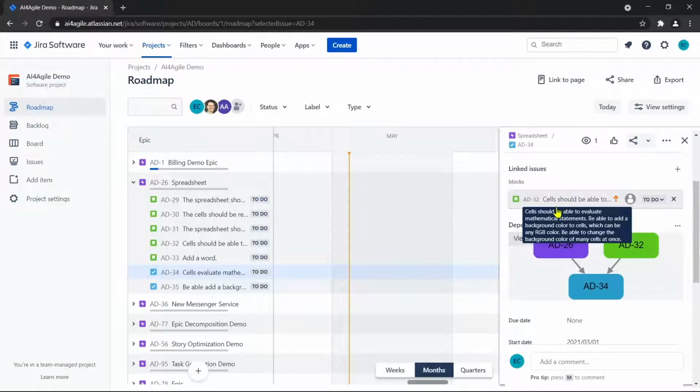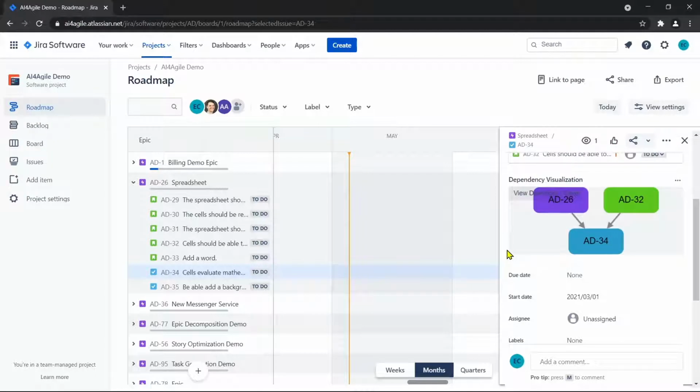The purpose of the dependency visualization graph is to help Scrum Masters assign tasks or help developers wanting to see which issues relate to one they were assigned. Each of the 2 graphs show epics, user stories, and tasks by their issue keys, and some explicit and implicit relationships between them, such as blocking, hierarchy, and issues assigned to the same developer.